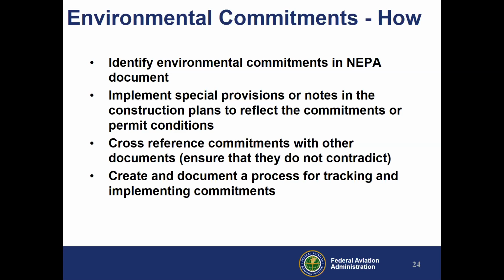And then in the design plans, we also want to call those commitments out clearly in a section so it stands out for the contractor when he's bidding his project. And there's occasions where we may include them also in a special provision. We always want to make sure to cross-reference commitments to make sure we don't have any contradictions, and create and document a process on how we're tracking and implementing those commitments.